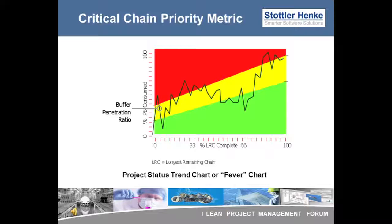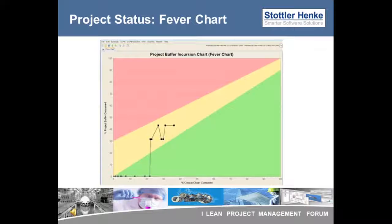The fever chart plots the percent of project buffer consumed against the percent of the total critical chain completed. One chart shows the project near its completion, with each corner showing where an update was provided. Another example of a fever chart provides a snapshot earlier in a project, where each filled-in box represents a project update. Initial critical chain tasks were completed ahead of their aggressive durations on average, then some later tasks experienced delay causing project buffer penetration. Since the overall buffer penetration is in the yellow, the project is in good shape. However, the trend matters: when the trend is more vertical, it may be a cause for concern, and the rate of buffer consumption would warrant further investigation.